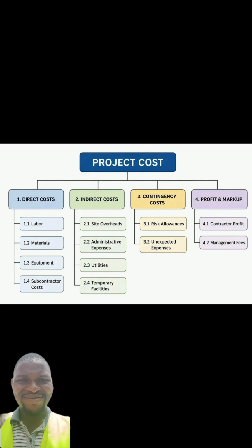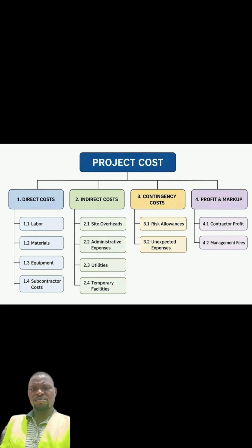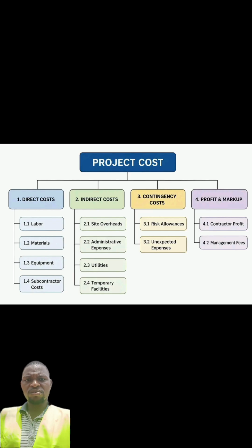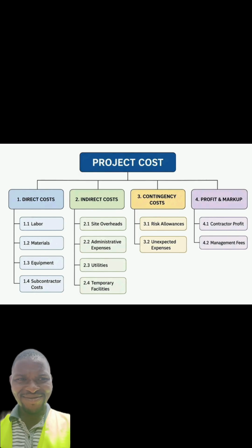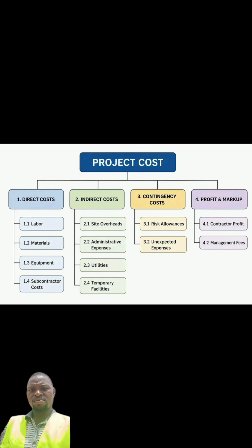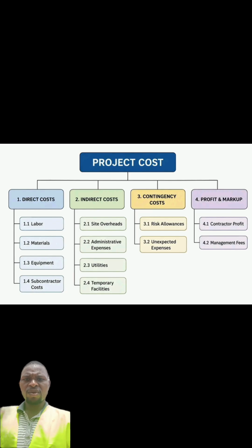These are subcontractors. So the cost for these subcontractors is very, very important. You have to actually know your costing, then factor in all these subcontractor costs, the transportation for delivering your materials on site, and so on and so forth. Then indirect costs, that is number 2. All these ones I enlisted at the first phase are the direct costs, right?